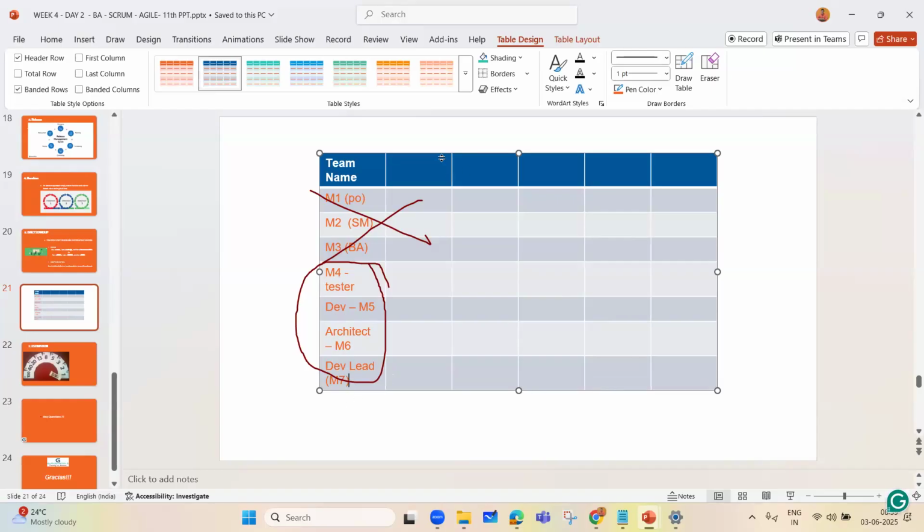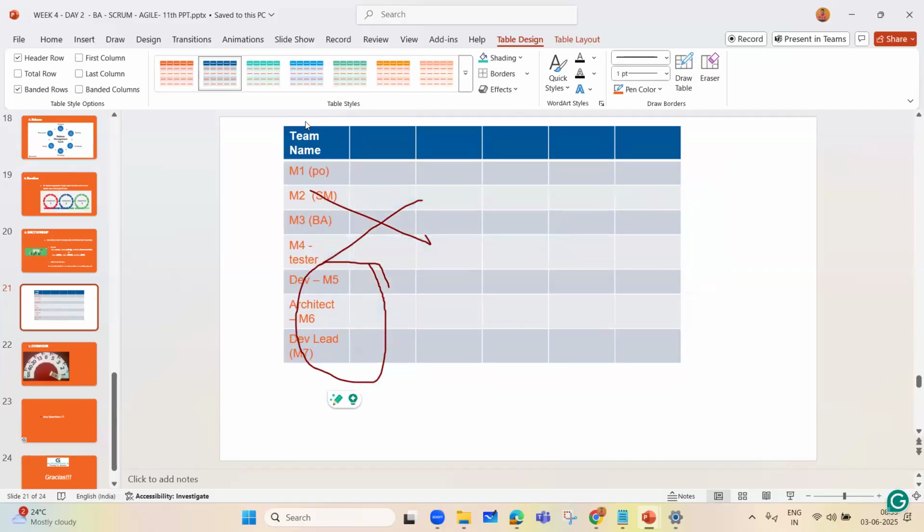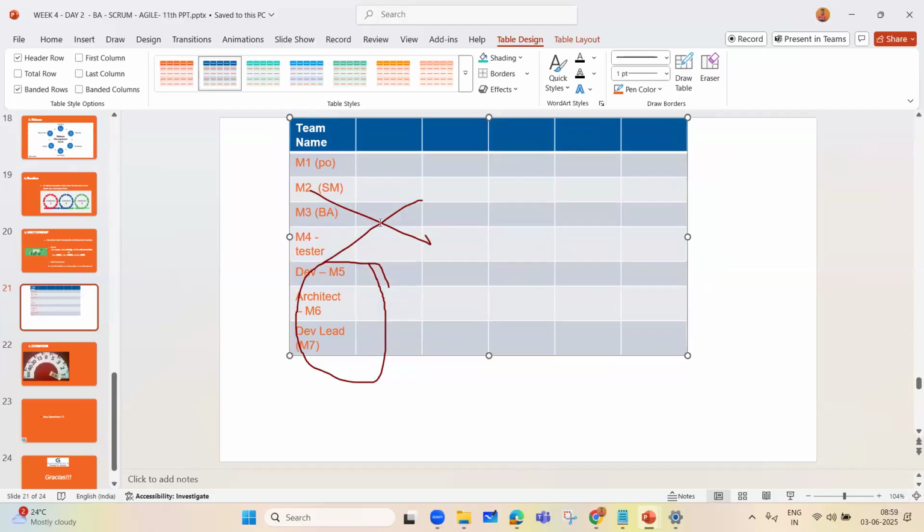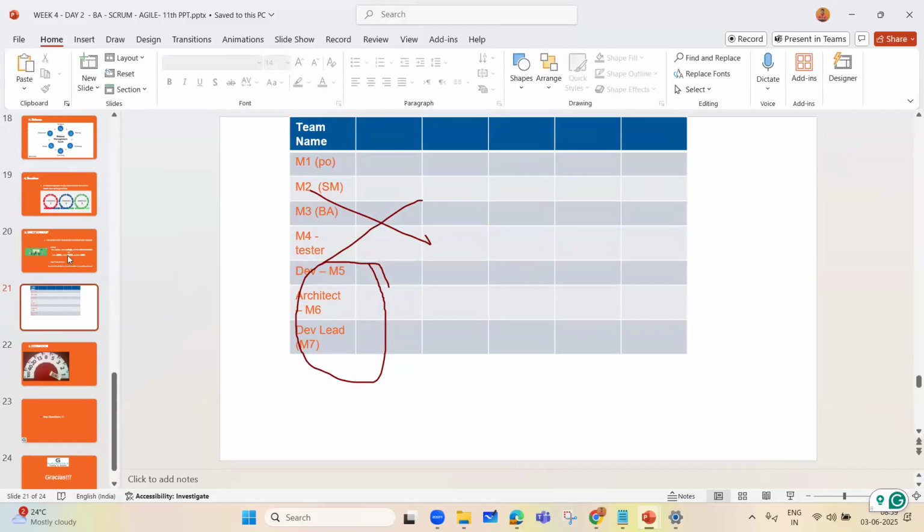Now understand. What is the sprint duration generally? 4 weeks maximum. And minimum? 1 week. Okay. Minimum 1 week, from 1 day to 1 week. But in an ideal scenario, it can be how much? It can be 2 weeks. So far, yes?